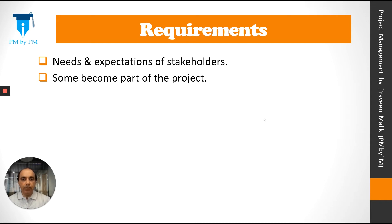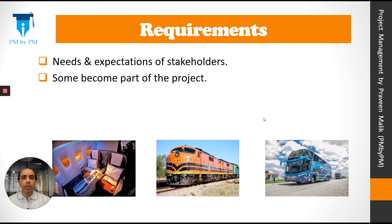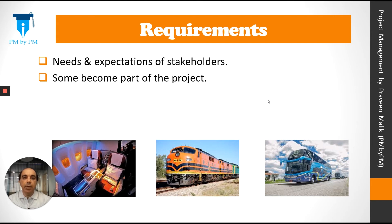Let's look at our holiday project example. Travel arrangements was part of the scope, and the travel arrangements can be done by airplane, train, or bus. Now different stakeholders might have different requirements — somebody might say they want to go on an airplane in business class, but others might say a bus journey is more fun. The requirements could be many, but some will become part of the project and others will not be part of the project scope.